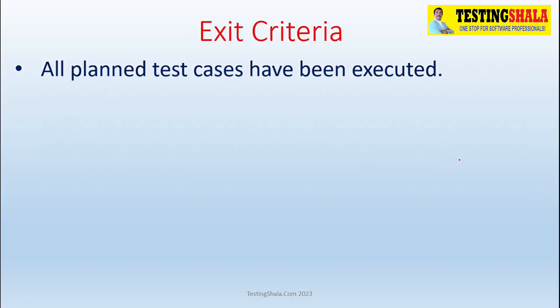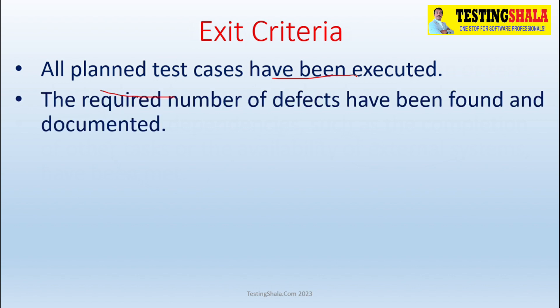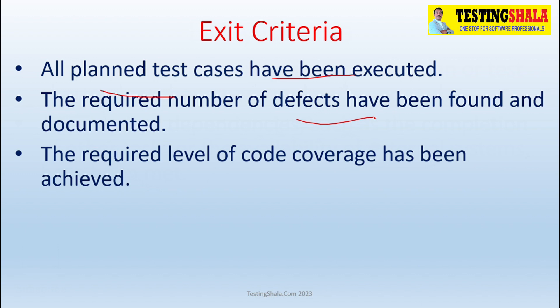Now we will understand the key exit criteria for a given software testing project. The first exit criteria is that all planned test cases have been executed — whatever test cases were created, planned, and approved must be executed in order to exit the testing project.